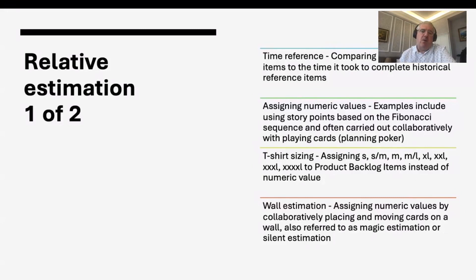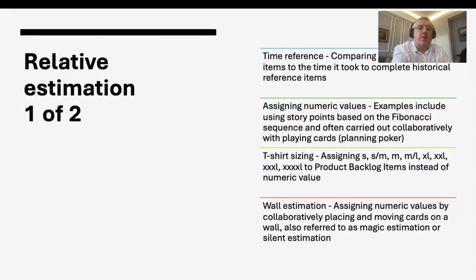Another approach is wall or table estimation: all cards on the wall or table, with silent sorting of items from smallest to biggest, and discussion where people disagree. You can do this not just for effort but also for value, ending up with both a value size and an effort size, which lets you re-rank your backlog — value divided by effort. I'll show the most popular techniques today; the full presentation covers additional options with their upsides and downsides.